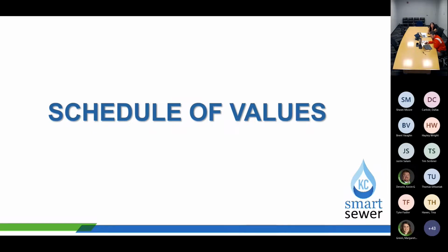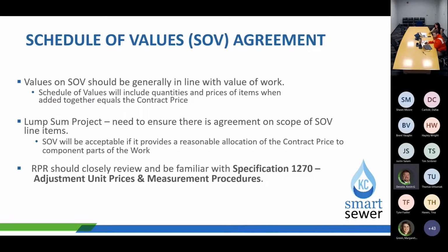RPR's role in reviewing and approving the schedule values. All right, thanks, guys. So looking into the schedule of values, there's a couple of different touch points to these documents for the RPR. The first one is in the initial phase of the project. Obviously the RPR is not going to be solely responsible for approving the schedule of values, but I think it's helpful to have them review it. I think they can have some insightful comments, and as they're going to be the one using the document to watch the progress of the project throughout, it's good for them to take a look at it early on.